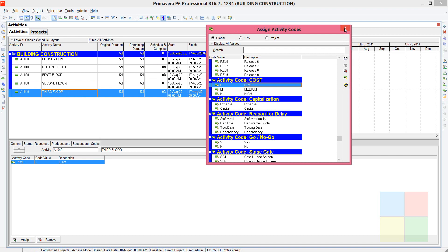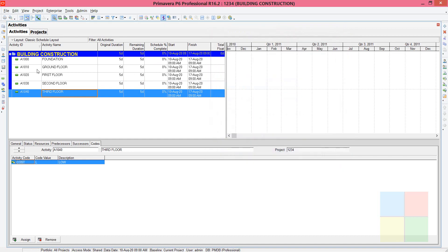As you can see, we have assigned the activity codes to the activities. This is used for visualization purposes — project codes, activity codes, and resource codes are all used to visualize activities, projects, or resources. In this case it's going to be activities.